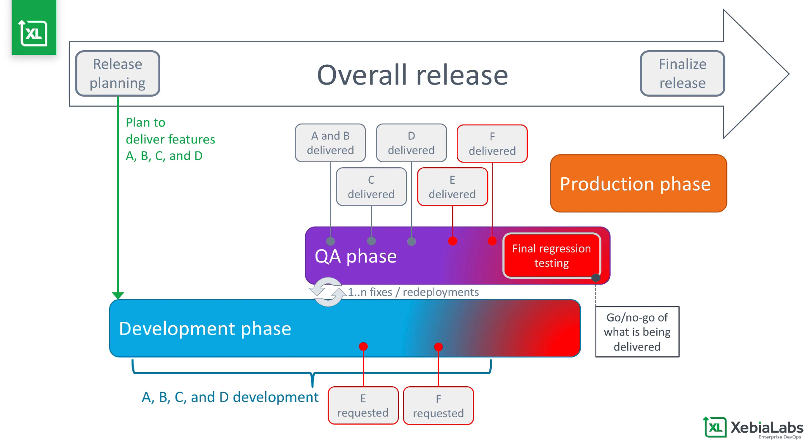When you can't track the events that prevent teams from delivering what they originally planned, features drop out without stakeholders knowing it, features are partially delivered, and schedules slip, all of which can cause failed deployments, cost overruns, and disappointed customers.